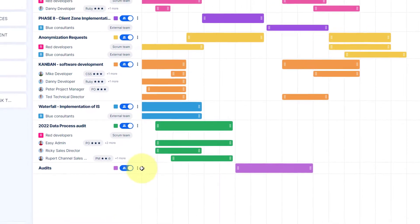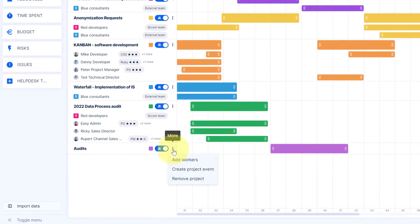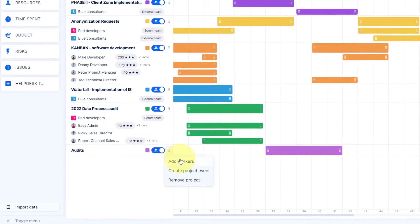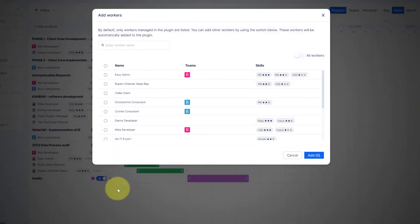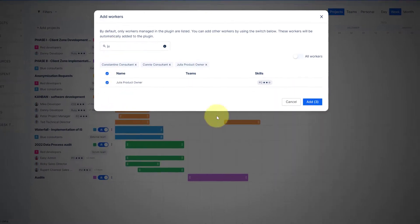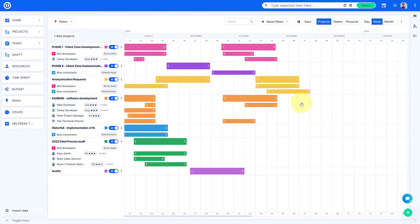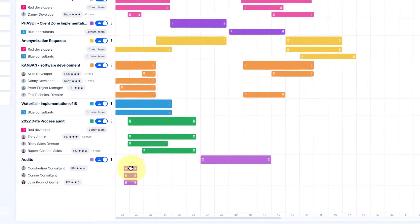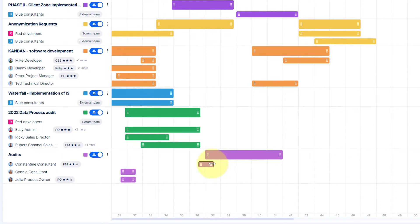The menu on the right side of a project name allows you to add workers from the list or by typing their names. To change worker allocations, you can simply click and drag and move it around the timeline to a specific time period.